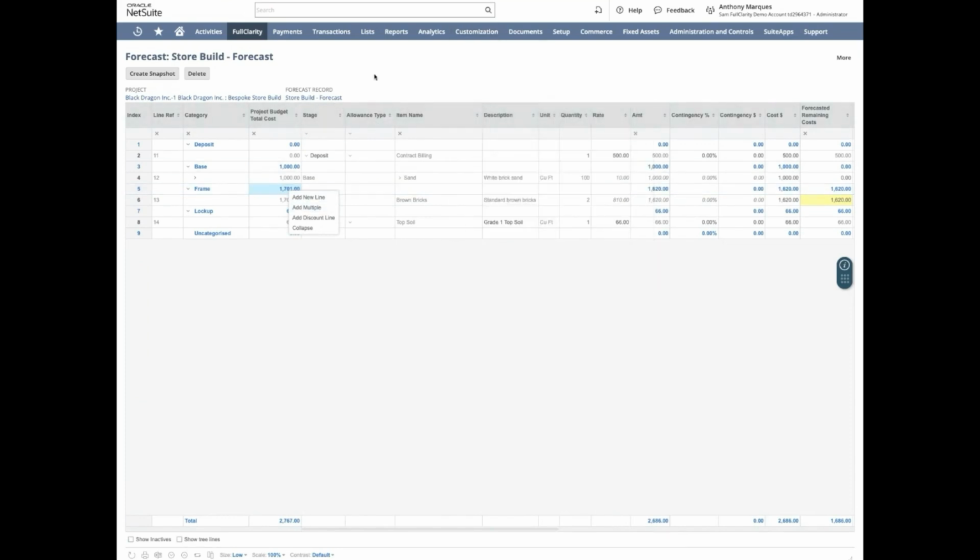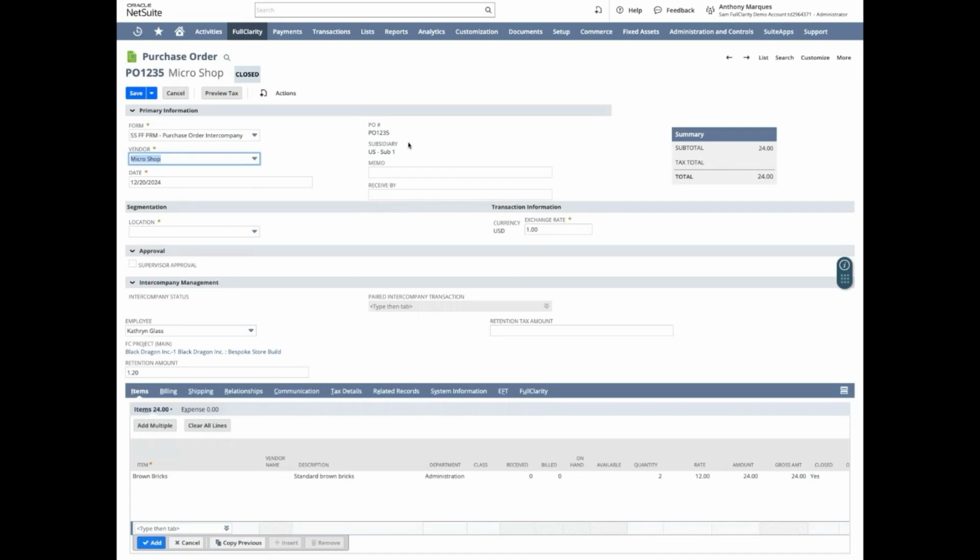You have a high level project. You then can launch your purchase orders from a project by right clicking on one of the elements. And typically what you want to do is issue a purchase order directly from within a project, because that allows you to take all the information that's already contained in the project record to make sure that when you do receive the elements and you trigger the accounts payable process, it's all triggered to that project.